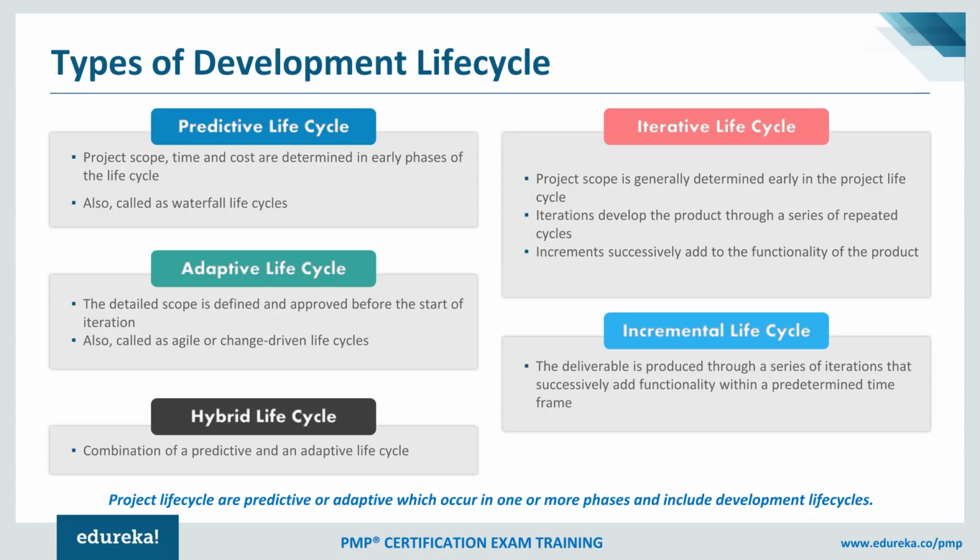Now, there is also a hybrid way of working wherein we do a bit of upfront planning, and we also respond to the changes that are coming on the project. So it's a combination of predictive life cycle wherein we are doing a bit of planning, maybe if it is a 1 year project, then you're doing a bit of planning for 3 months. And then you are also building iteratively, incrementally. At the same time, we are showing the demo to the customer, taking feedback, and then responding to the changes that are suggested by the customers in the upcoming iteration.